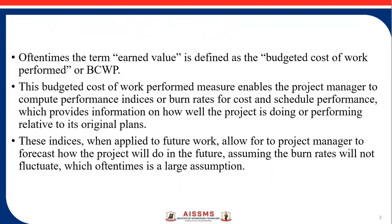Often times the term earned value is defined as the budgeted cost of work performed, or BCWP. This measure enables the project manager to compute performance indices or burn rates for cost and schedule performance, which provides information on how well the project is performing relative to its original plans. These indices, when applied to future work, allow the project manager to forecast how the project will do in future, assuming the burn rates will not fluctuate.